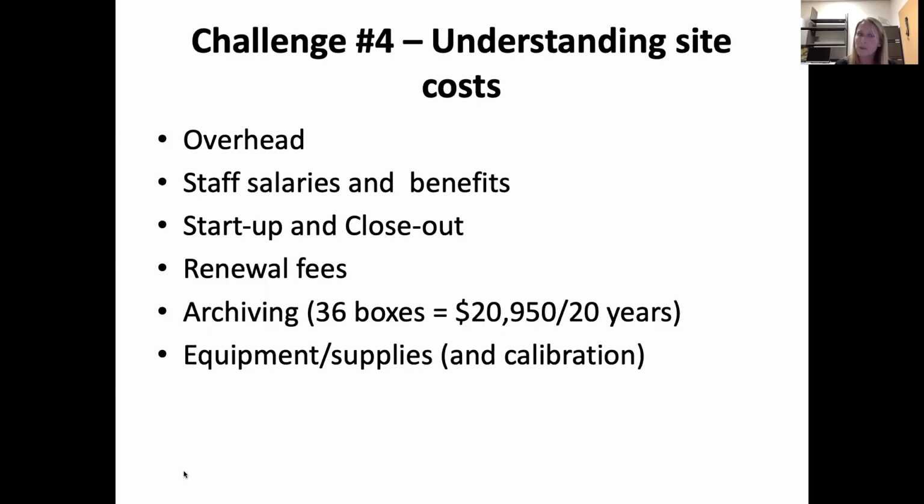You might have pharmacy renewal fees every year. They might charge you a renewal fee to go through any changes and just to start a new fiscal year. Imaging sites might have the same type of fees, as well as if you have any lab costs. So you just have to know what these fees are and then make sure that you incorporate them into your budgets.